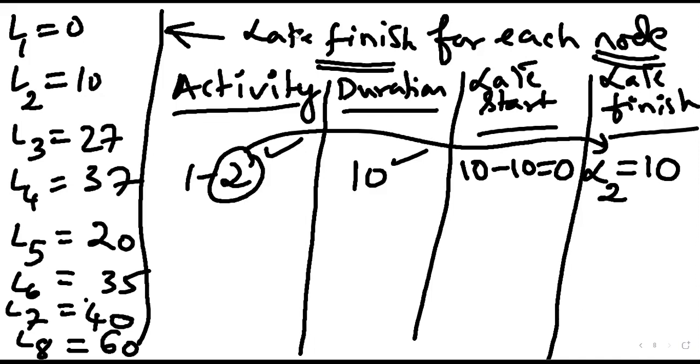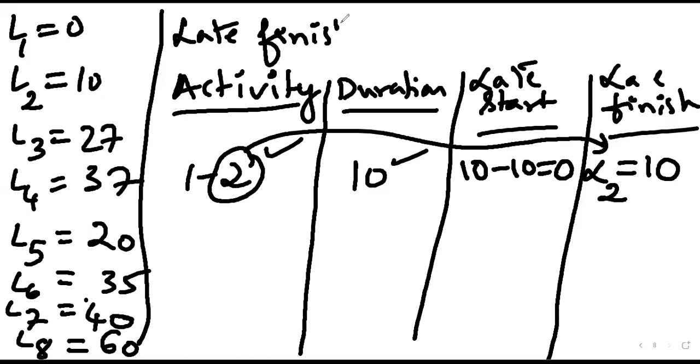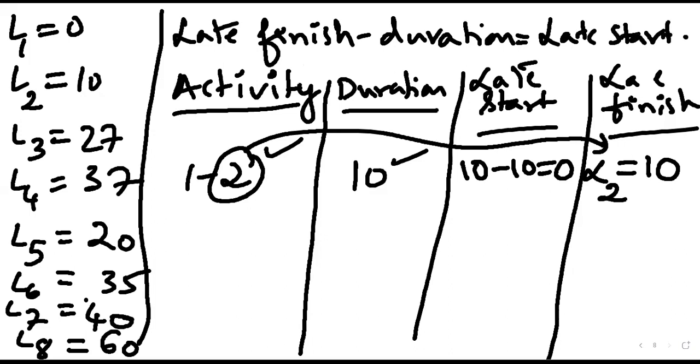So we'll just write the explanation for determining the latest start. Late finish minus duration is equal to late start.